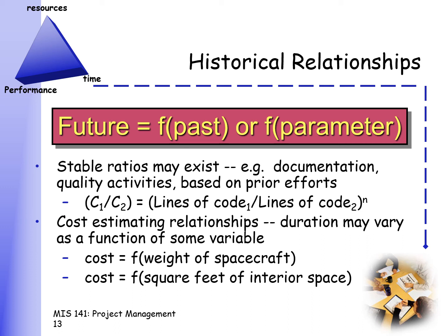the contractor will tell you, okay, for every square meter, if you're going to create a two-story building, for every square meter, that will already cost you 100,000 pesos. And that 100,000 already is all inclusive from the plumbing, the materials that you're going to need, the paint, the electrical, automatic. Okay? And that's from an architect's point of view, what we call a rule of thumb.